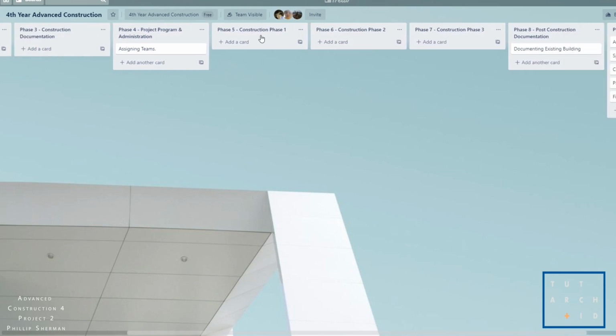Okay, phase 5 gives us a basic program to say, okay, on this day we will arrive at site to do pre-inspection and see if the site is clear. Then the next day we would bring material from the university. However, we're still constructing at the university and the first batch of materials will be sent to site. Construction phase 2 is now delivery, where materials have been placed in the prefabricated material. We will need 1 to 2 weeks to do construction on site.